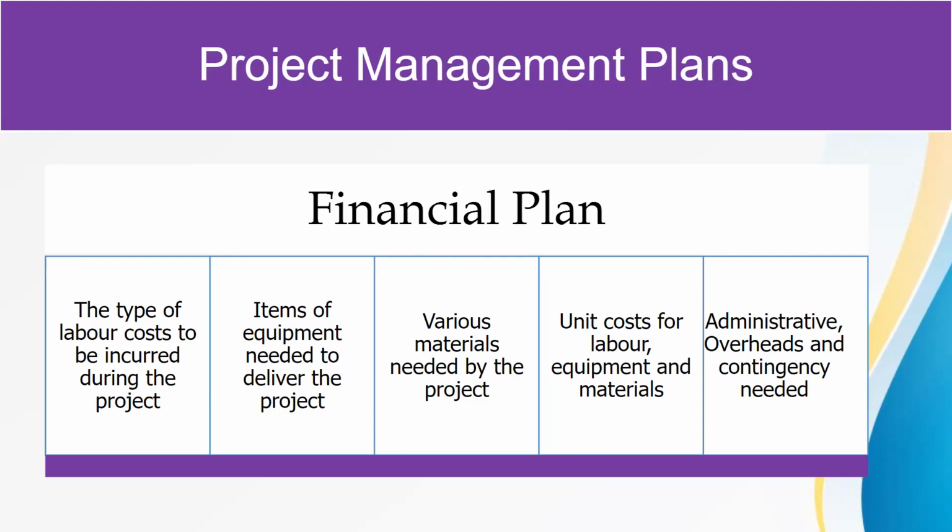The overhead cost is looking at indirect costs or fixed costs for your project. Those are costs, money you spend on rent, utilities, fuel, electricity, internet, salary of employees, and other money you spend on maybe software, advertisement, and so on. Extra money spent, apart from what you directly invest into the project, you have to include as an overhead cost.